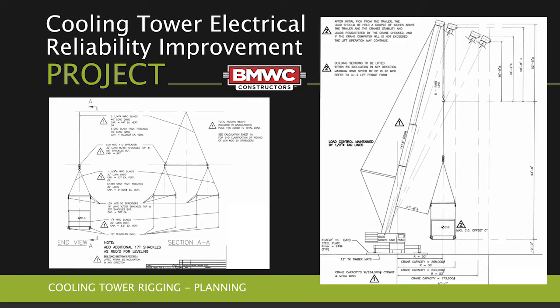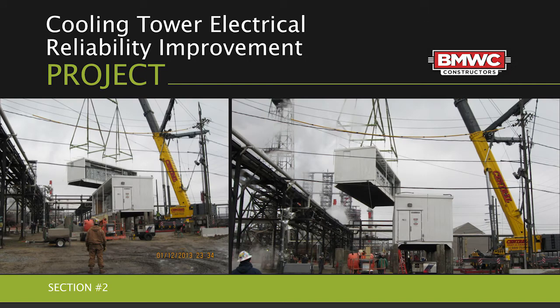With the crane itself, actually the size of the crane, we had a 550-ton rope, and anybody that has worked with this machine in the past knows that we're trying to maneuver this thing into a tight area. We have to make sure that the ground is stable in that area, so that's all tested beforehand. And actually, we had to go through the week prior to setting up this crane, and we had to rework the ground, which BMWC did, in order for it to be stable and suitable for the weight that it was going to be handling. As far as that goes, everything went smooth.